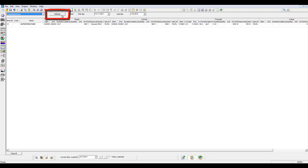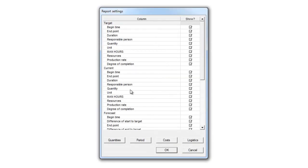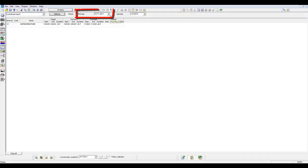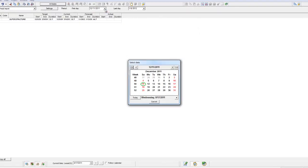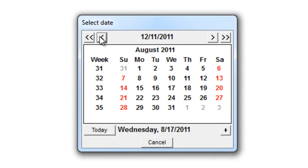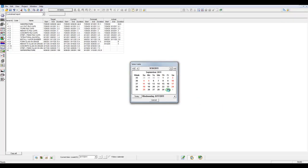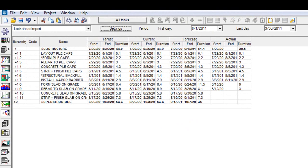Let's get started and adjust the settings. We can use the Period Auto Load function to select the most important data. We can also adjust the dates of our Look Ahead Plan. Let's see what's happening in the month of August to September. Note that the Look Ahead Plan will automatically filter the tasks which are occurring during that time period.